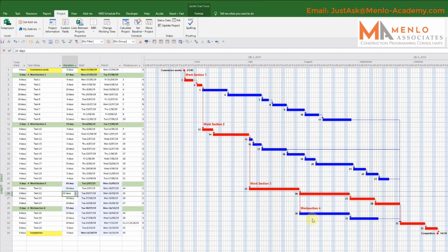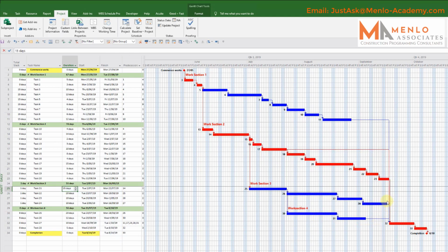So this is why it's important to know how much time you've got sitting around on jobs that are not on the critical path. Because any of these jobs in this chain of work could literally start 3 weeks late and would only then become close to the critical path. Whereas this chain of work, any one of these only needs to take a day longer or start a day later, and they'll become critical.